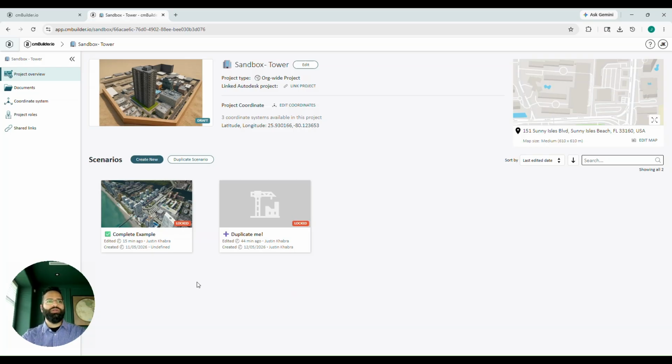For example, if you're in the planning stage, you might have 2 versions of a schedule you're considering or 2 different logistics plans. Go ahead and create a scenario for each. You might want to plan your project in both scenarios until you choose the direction you want to go long term, at which point you can head back to the project overview page and probably abandon one of those scenarios. Just move forward with your main scenario.